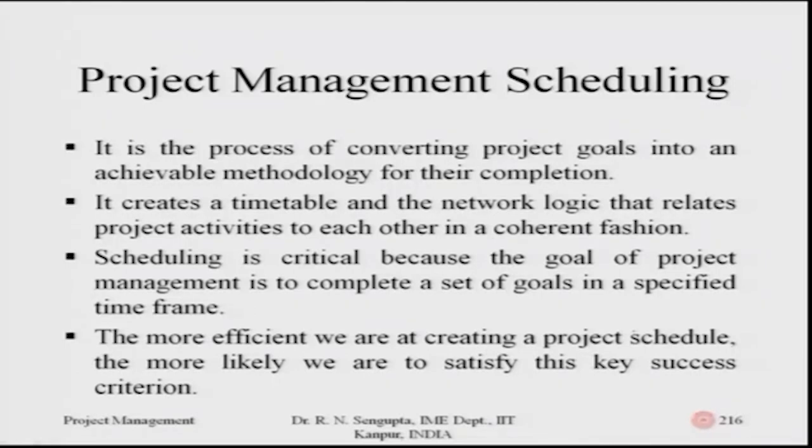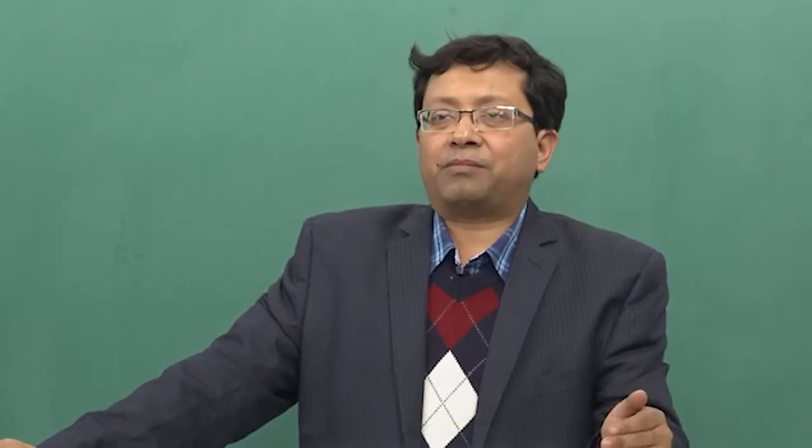Scheduling is a critical part, because the goal of project management is to complete a set of goals in a specified time, in the specified set of activities, and how they flow. Say, for example, if you are trying to build a house, your first objective would be to build the base. Then, considering the base is built, you go into the first floor, second floor, and considering that has been completed, then you build the electrical system, the sewage system, and the corresponding things.